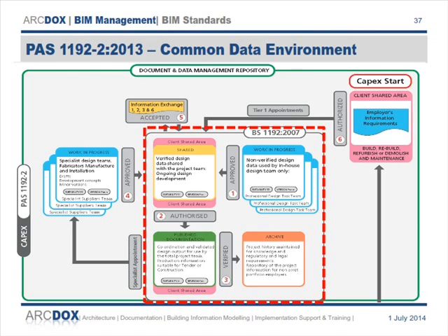The first one of those being work in progress. So work in progress is where each party has their own work in progress information. So there'll be an architectural work in progress, an engineer's work in progress, MEP work in progress model, and that'll be their own model, which continues to develop over the course of the project in their own environment. There's then an approval gateway that goes through to a location where the information is shared. So by share, they mean you can then link that information into your model for coordination purposes. Okay, you can use it as a reference for developing your design.